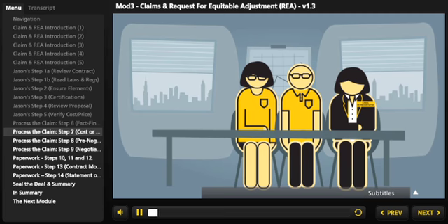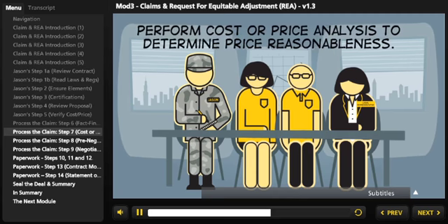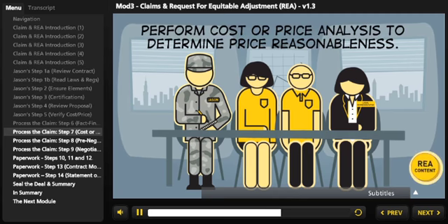Then, the team performs cost or price analysis on the contractor's proposal. Jason works closely with the technical team to accomplish an analysis of the contractor's proposal, ensuring all team members are aware of what is being claimed and that they have the opportunity to have input about what the contractor is claiming. The team decides what costs are allowable, allocable, and reasonable to the work effort being claimed. There may be upward and downward adjustments as a result of a good analysis. Request additional field pricing support if necessary.